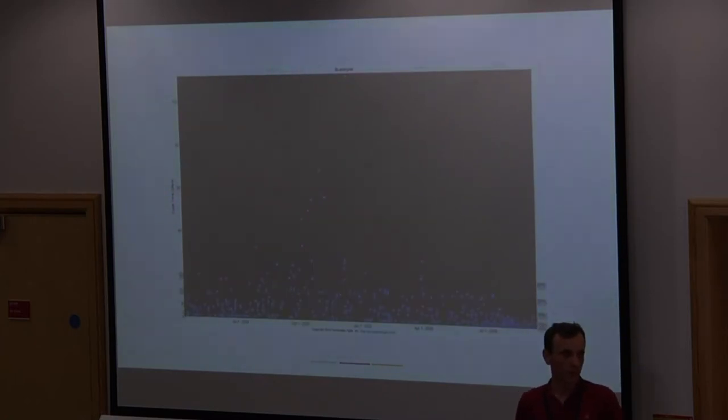So then I have data, and I can look into each dot. In essence, it represents a Jira ticket, for instance. I can go into the Jira ticket, I can look at the history and understand why things happened, and try to avoid that. Again, another kind of analysis I can do, I can look at these two clusters, for instance. So I can see something happened there that suddenly took longer to complete, and something that took less to complete. Again, this tool cannot be used to prevent it, because remember the dot appears on the scatter plot only after the item has been completed, but I can still go back to that red cluster, understand what were those items, what has caused that to take longer, and try to avoid those type of patterns to happen in the future. Conversely, reducing cycle time, while on the face it could be good news, it could be caused by weekends and overnight. Again, you want to make sure that you understand your system, because I'm going to touch upon later on, we're going to use the data from the past for the forecast of the future. What you don't want to do is create new forecasts where you baked in a lot of worked weekends and overnight.